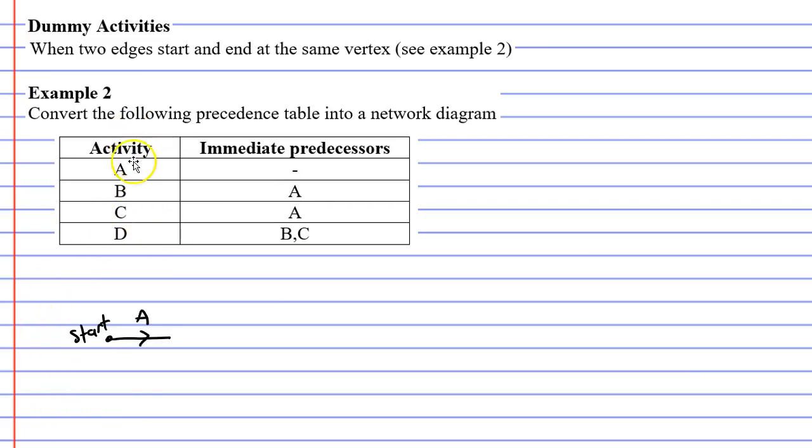You might notice that both activities B and C come after activity A. So we need to complete activity A with a vertex, and both activities B and C come out from that vertex.